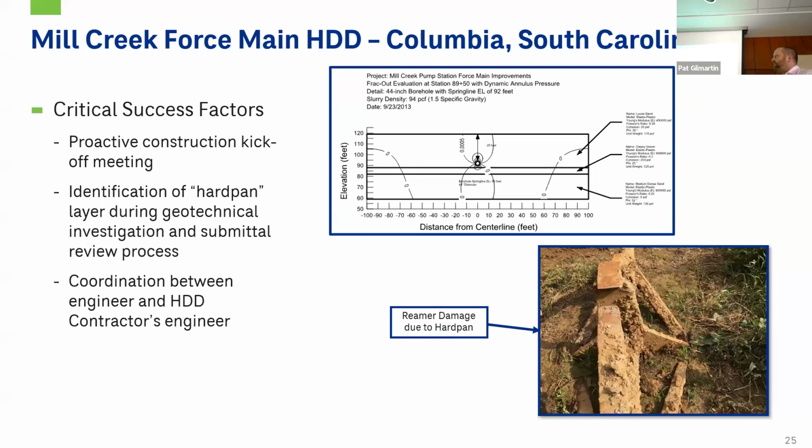And so ultimately for this one, we did have a pre-construction kickoff meeting that gave those lines of communication that made sure that we only had about an hour or 2 of downtime when they had the issues with trying to drill through that layer. And that identification of that layer during the investigation was really key to saving the owner money from potential issues with change orders and differing site conditions.